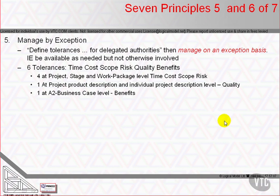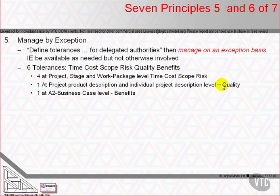Delegation of authority from one management level must set limits, both plus and minus, on the allowable variation in completion date, resource usage, conformance to specification, inclusion of required elements, degree of risk, and ability to deliver benefits. Of the six tolerances, four of them — time, cost, scope, and risk — are managed at project, stage, and work package level. Quality is applied at the level of the project's overall result, and each work package includes individual product descriptions. Benefits tolerance is managed at project level through updating of the business case and the project board's reassessment of the benefits to be received.